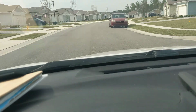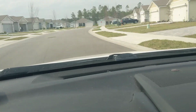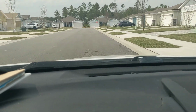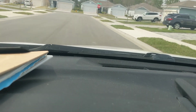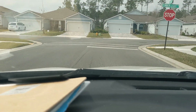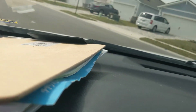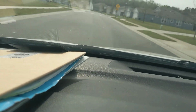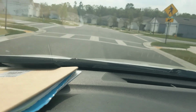That is the base we use for the pavers. So again, I'm gonna have the irrigation company run sleeves underneath the future driveways so they don't have to jet their irrigation line under the paver. So I want to get that just hand dug and move on, be done with it. I'm waiting to find out if the irrigation water will be usable on phase 3. I'm waiting word from the site developer there. Of course, I do not want to go to landscape and sod if I can't irrigate it and let it all die. So waiting to hear word from that.